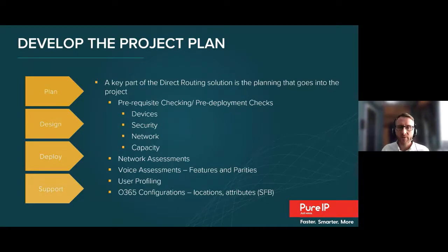A useful mechanism which has significance for all project stages is profiling the users. That process should capture features and functionality used by the business units and roles today, as well as considering how those will change in Teams with the new design. Those user profiles or personas make delivery much easier. You can efficiently target training, perform detailed testing on focused features, and build both deployment and in-life scripts for standard users.